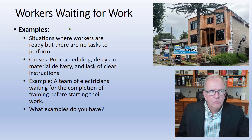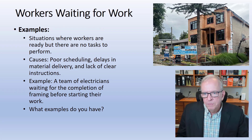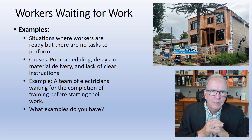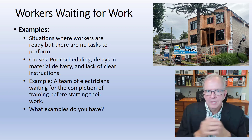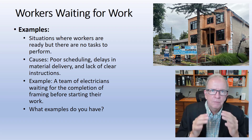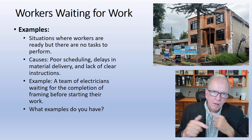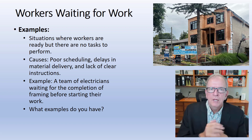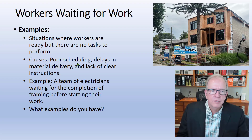Here's an example of workers waiting for work — a house being built down the street from me that just sits there idle every other day. Instead of taking eight months to build it's taking like 14 months. When you lengthen a project you still pay property taxes, interest on loans, management overhead — there's a per diem cost every day, a clock ticking that's incurring costs even if nothing is getting done. Tightening that up with more continuous flow helps reduce costs.